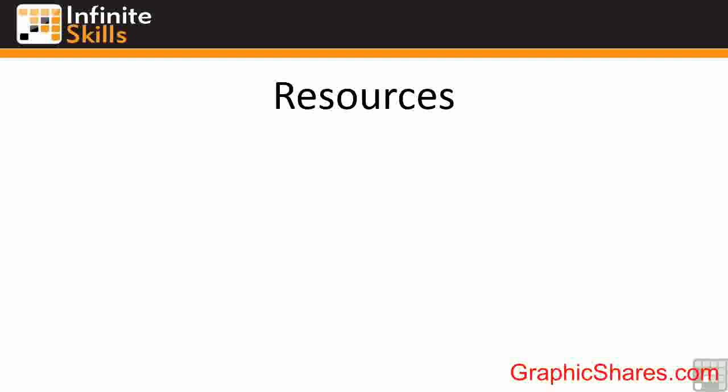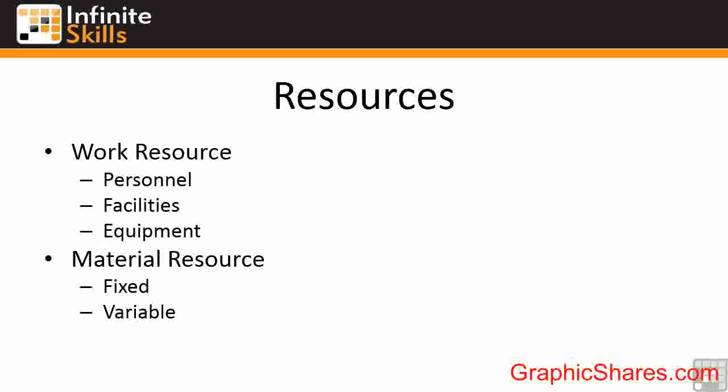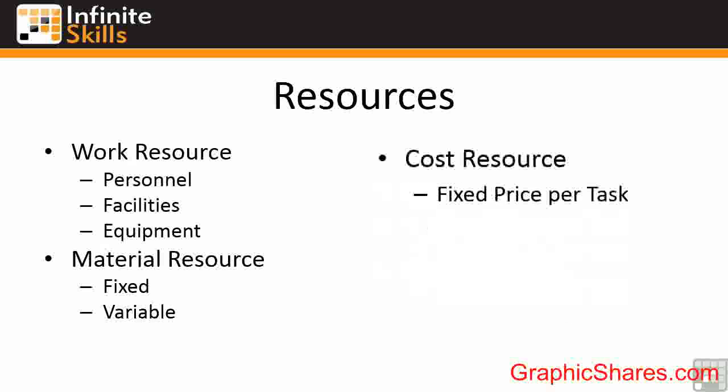We then need to look at resourcing all your tasks. Resources are broken down into work resources, which can include personnel, facilities, and equipment — anything that uses money on a time basis. There are material resources, which can be fixed or variable, and effectively use money on a per item basis. And then there is a third type: cost resource, which has a price per task that can differ for each task. It's not set per time unit or per physical unit — it's just a cost per task that you can attach to build up the costs for the whole project.